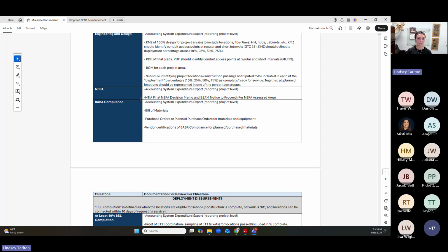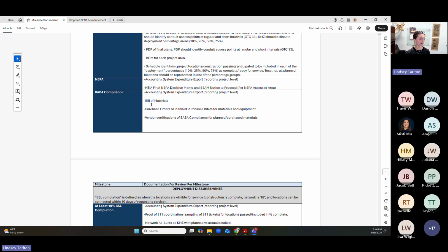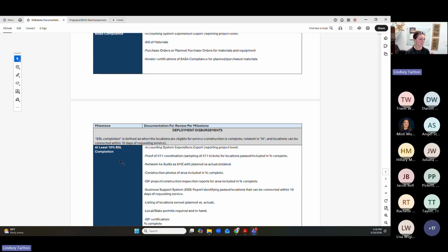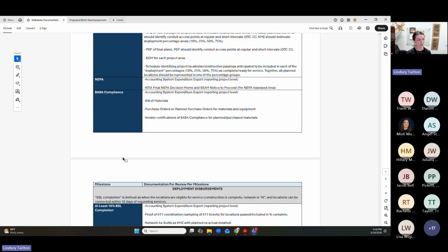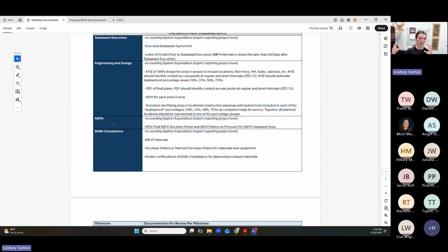So I know there were some questions at the beginning of if milestones have to be contiguous and in order. Answer is no, just because there is a world where you could begin obtaining BSL completion milestone reimbursements prior to your NEPA milestone, if not all NEPA areas are cleared underneath that reporting project at the same time. I know that was a lot, so Angel, help correct me if I missed anything or add any clarity.